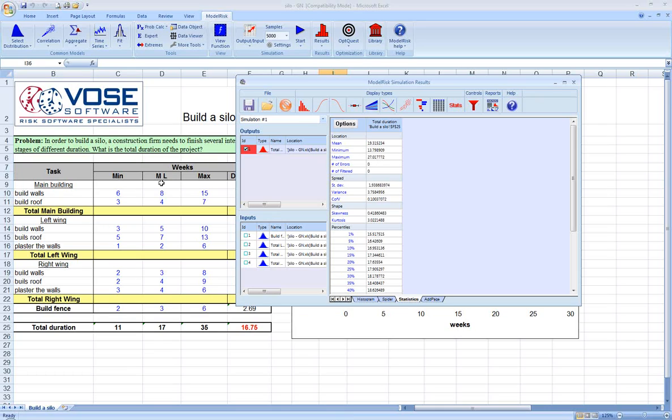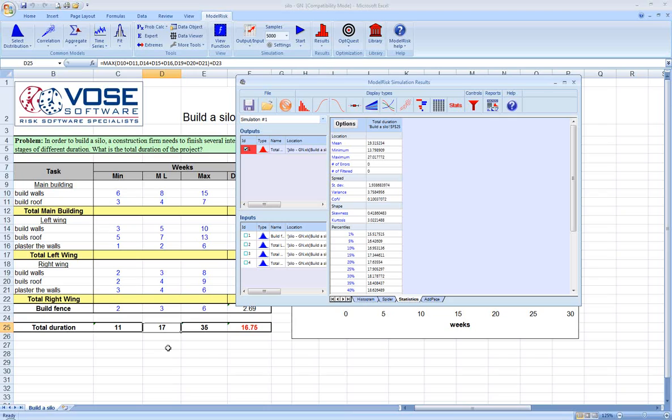This is really why so often projects tend to go either over budget or over schedule, because when not using quantitative risk analysis, what's often done is people take the most likely value for all the different phases, add them up, they get the number 17 in this case.